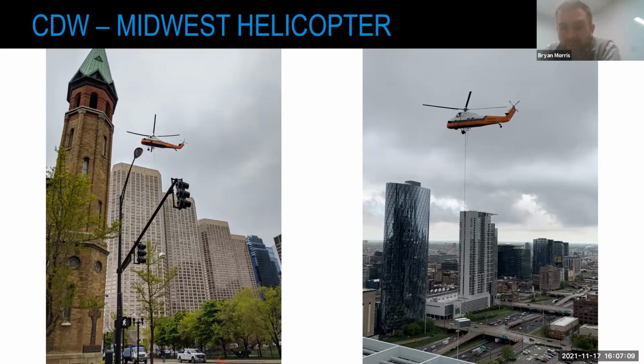But Ian brings up another great point. If these picks are happening during the fire season, you may not get it. There may not be any availability. So again, you got to really think through this, especially 2 months. A couple of months later, that could have been the fire season, and good luck. You're going to use that crane. It's going to take you a week to get that up there. And the federal government obviously takes precedence over us lifting an air conditioner up on the top of a building.